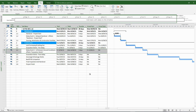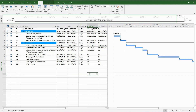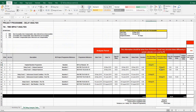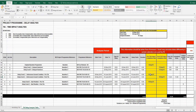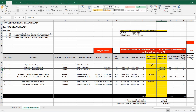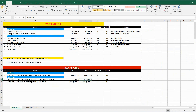Just a quick reminder: please note that you have to update the delay analysis table while progressing your time impact analysis — change the calendar dates and the durations, insert whether it's a critical or non-critical activity, and so on and so forth. In general, populate all the relevant sections of the delay analysis table. We've finished populating the delay analysis table, so let's move on to the next delay event.